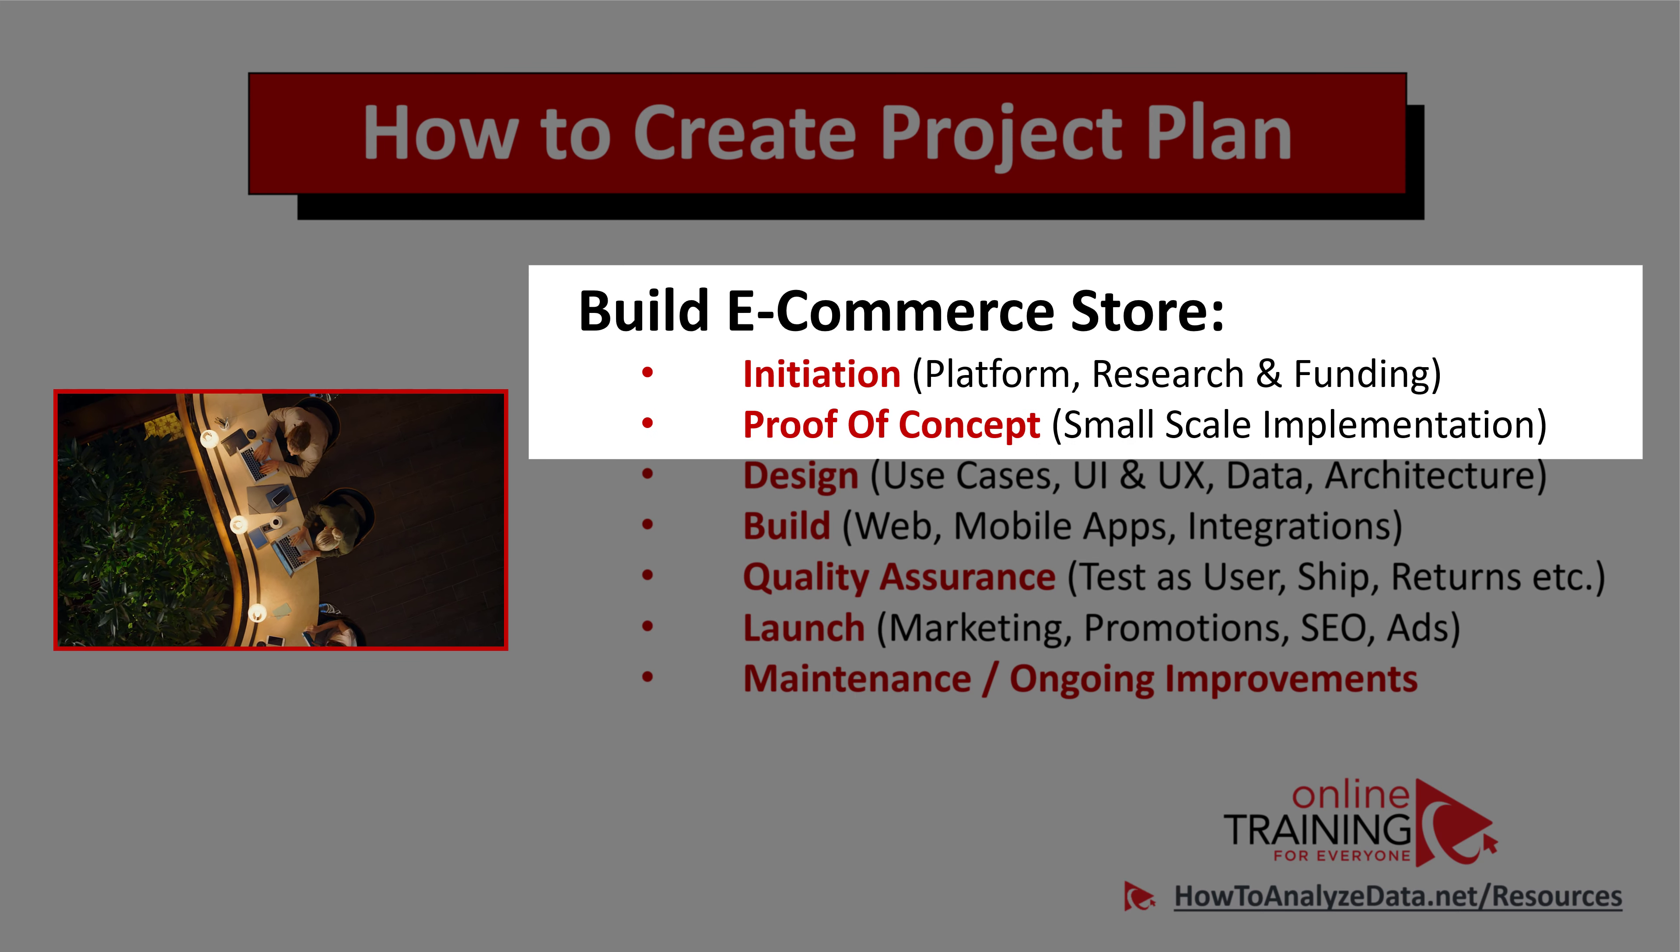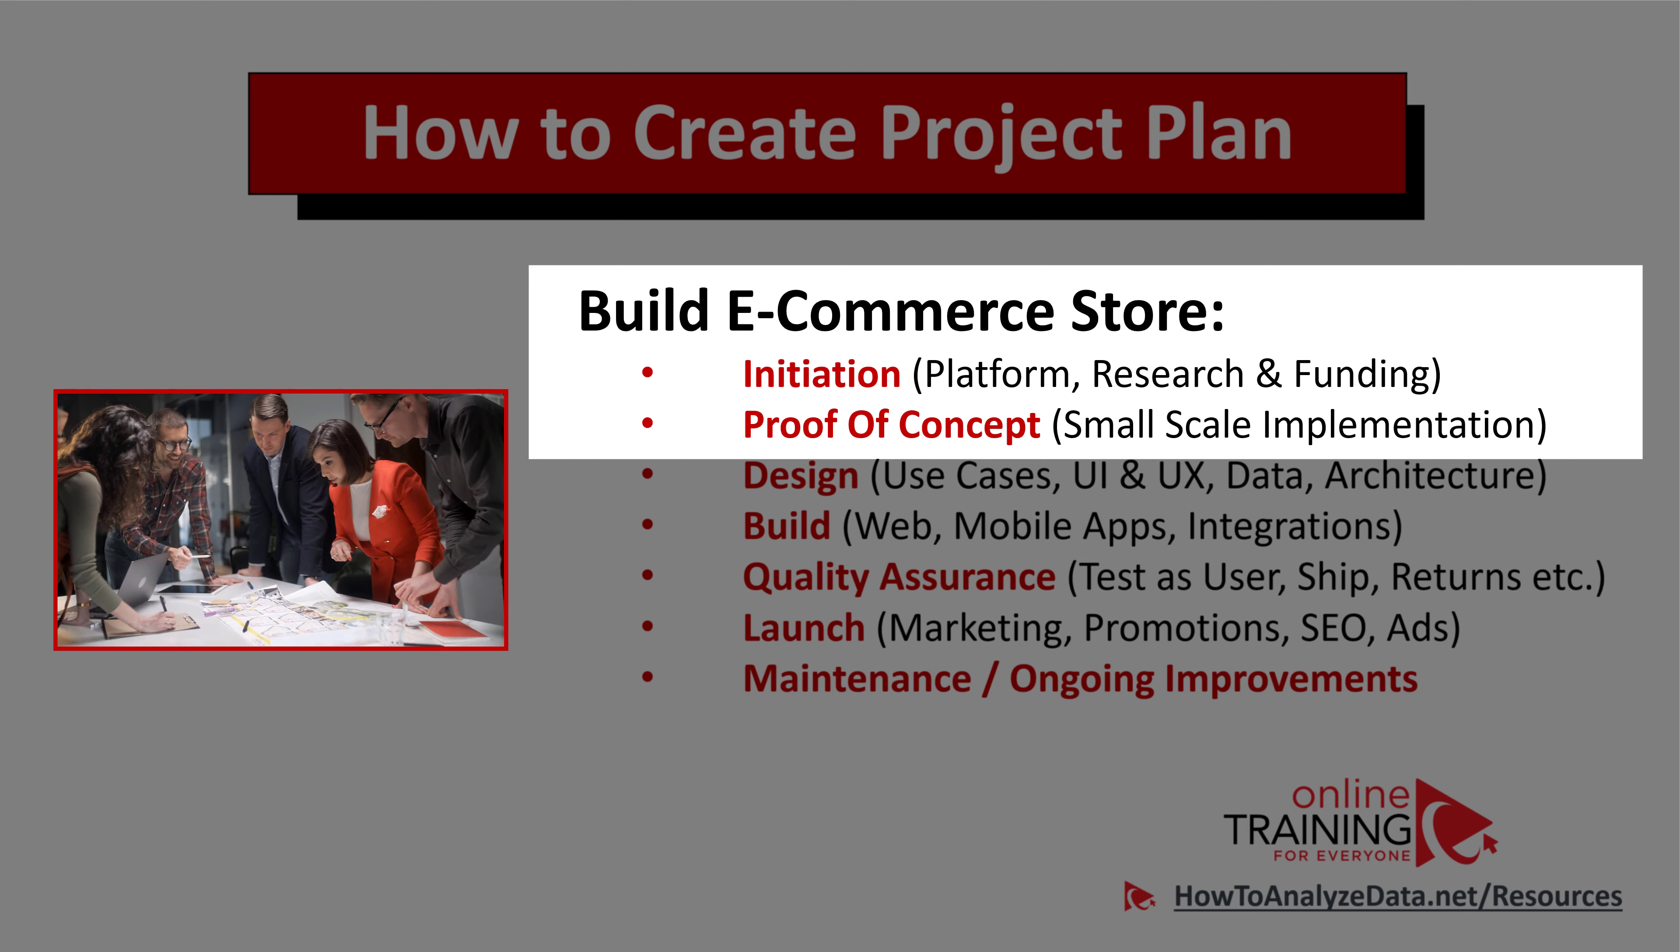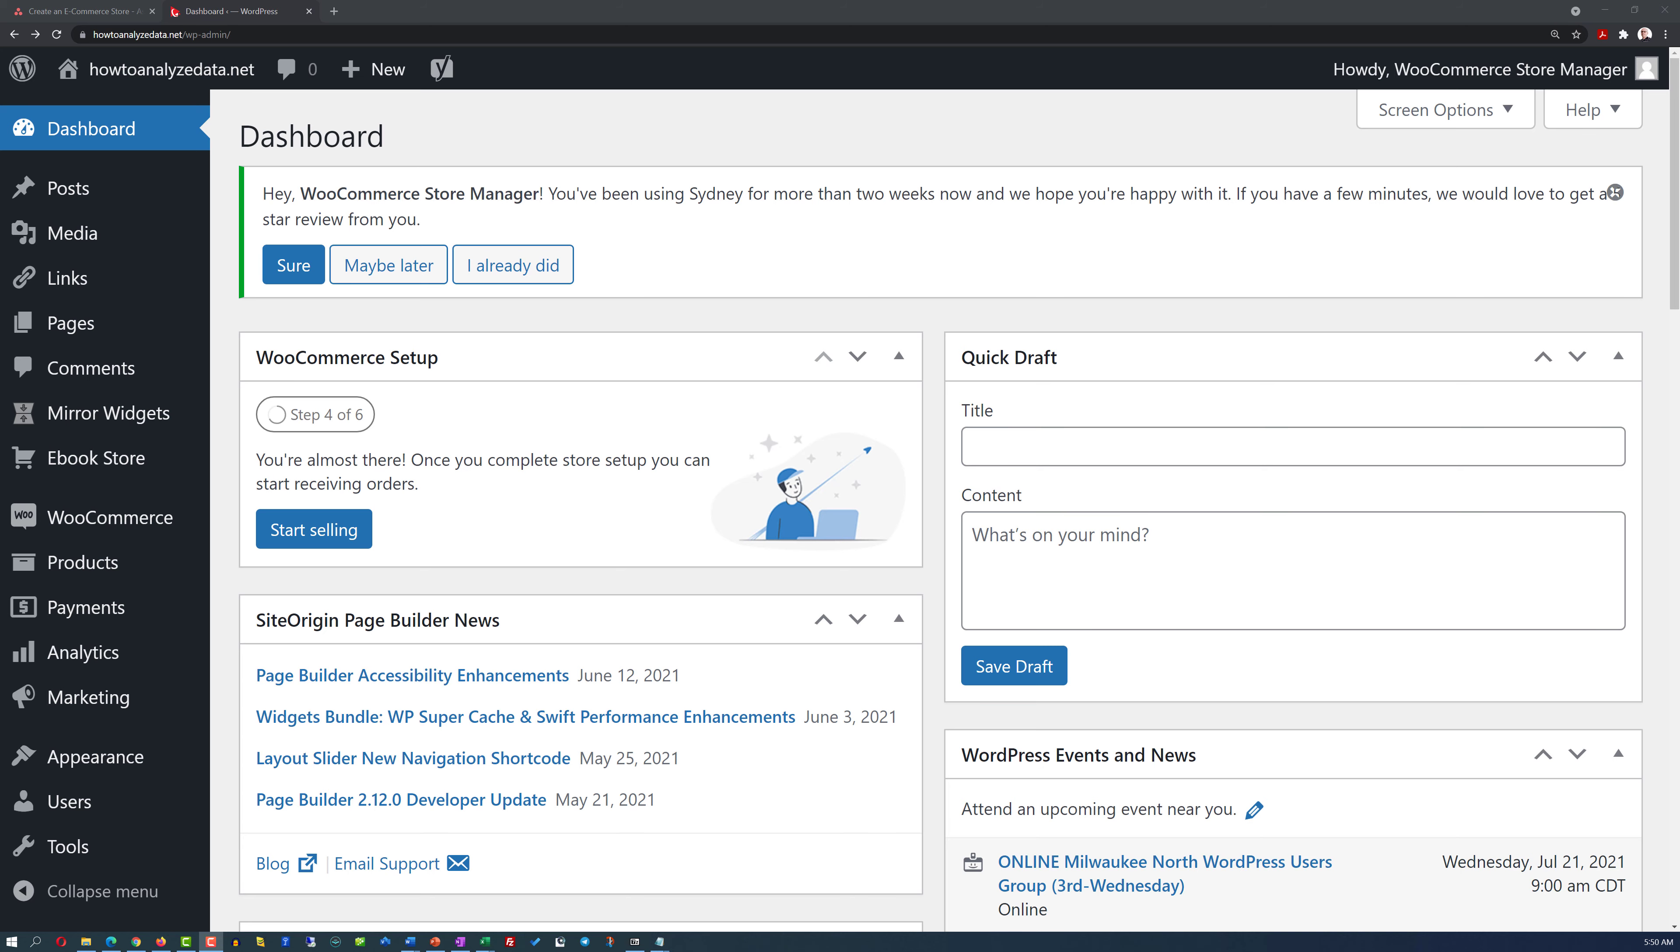During the proof of concept phase, you do a small-scale implementation. For example, if you would build an e-commerce store, you will try to go live with a small store. Maybe selling instead of 100 products, just 10 products, or maybe selling the full scale of products, but presenting it to a smaller list of customers.